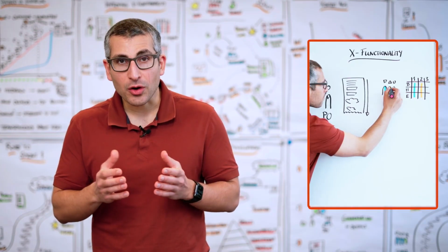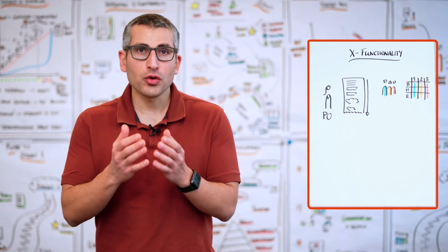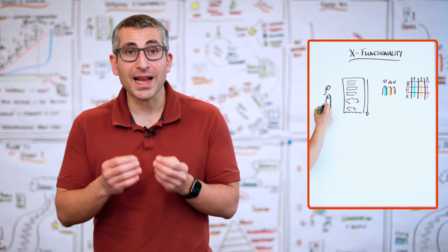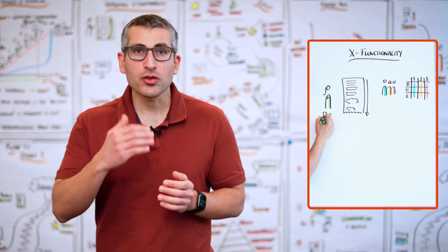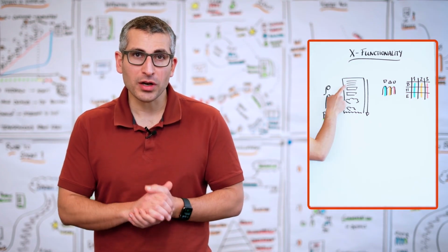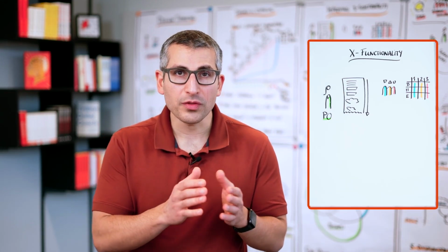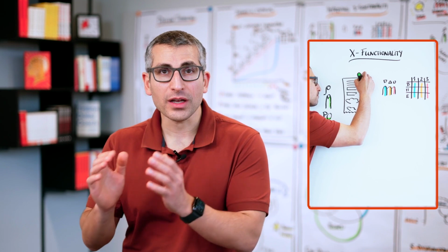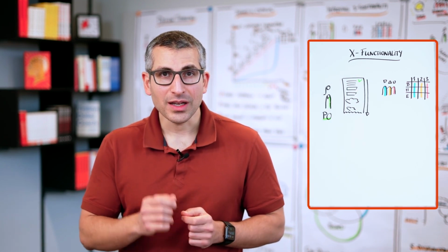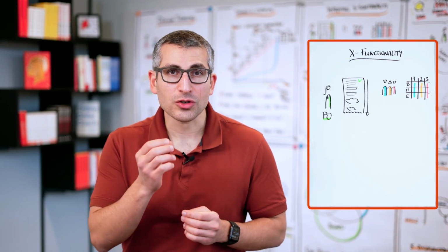Now, in our first scenario, where we have this group, we go into sprint planning. And during sprint planning, as a product owner, you present the sprint goal, which is an outcome that you want to achieve, and you start out by explaining what is the highest priority item in your product backlog. The developers take a look at it and they say, wonderful, we can move this item from the product backlog into our sprint backlog. Now you're off to the second item. This time again, you explain it and you demonstrate how it is connected to your sprint goal.